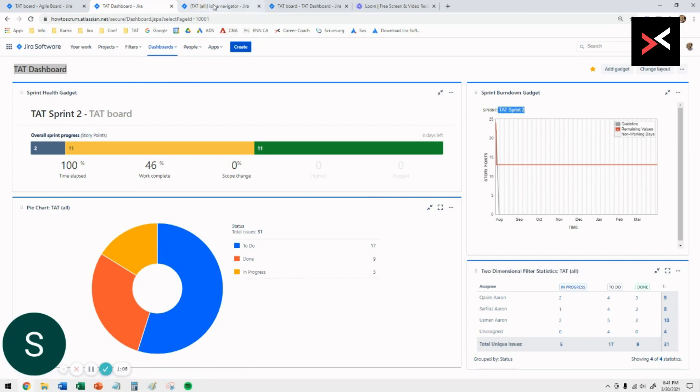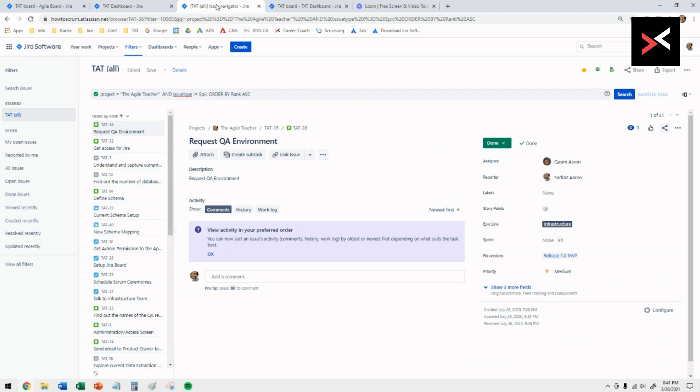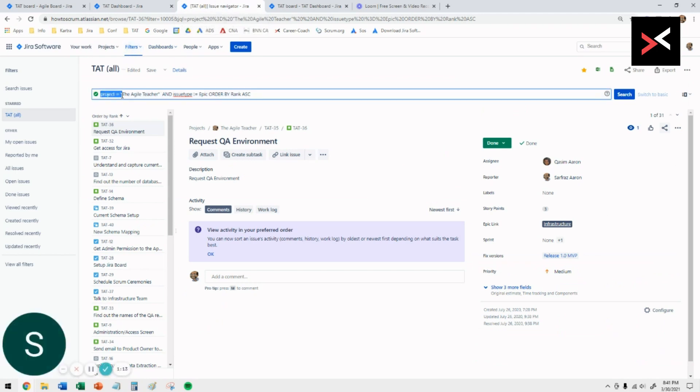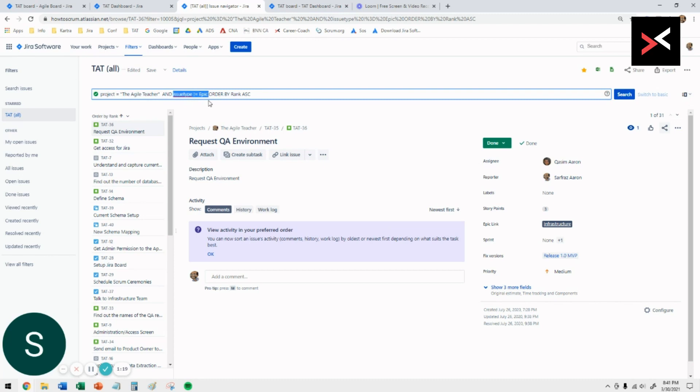To do that, we're going to start off by creating the filter that has all the issues for your project. Under the filter, you're going to create project equals to your project name, in this case the Agile Teacher. And I do not want to see in the issue types epics, because I only want to see stories, tasks, everything but epics.